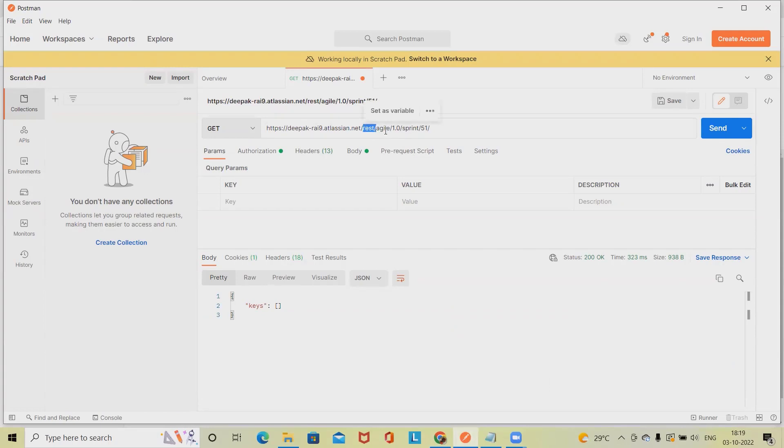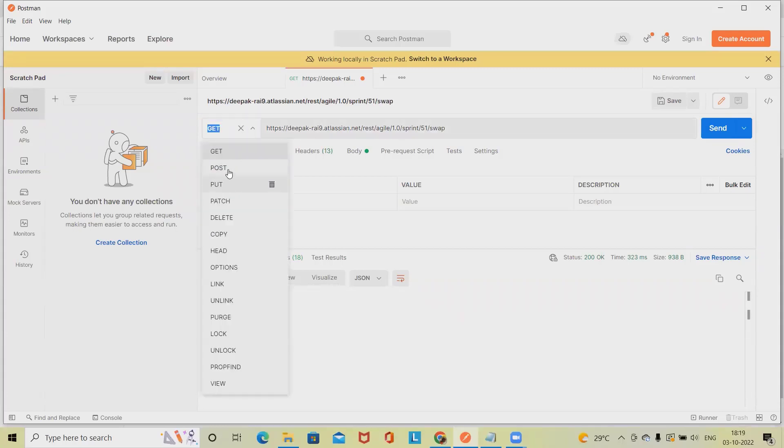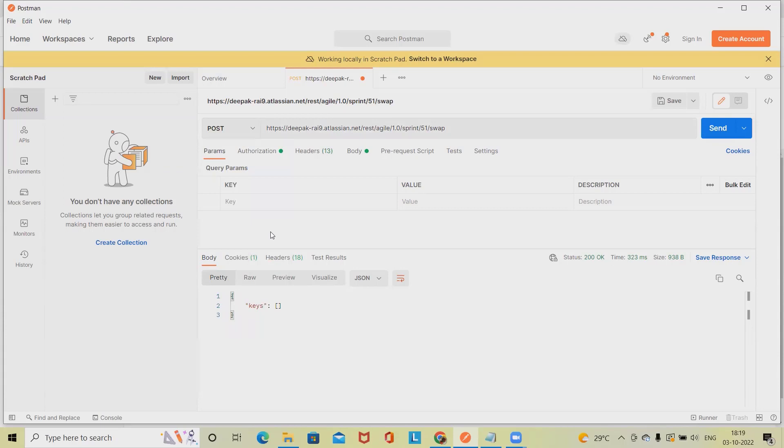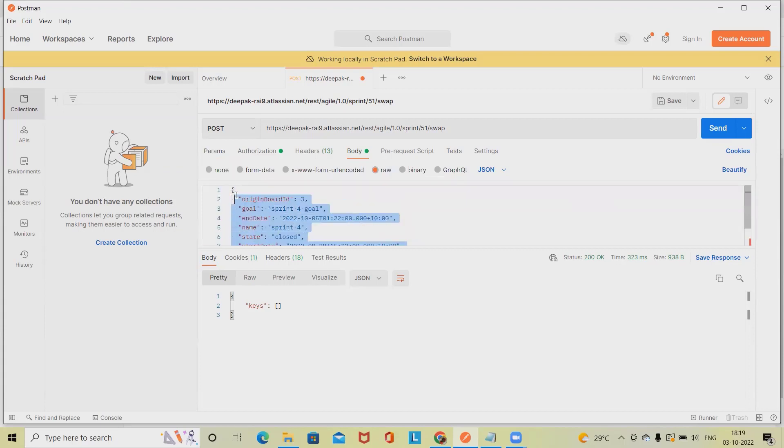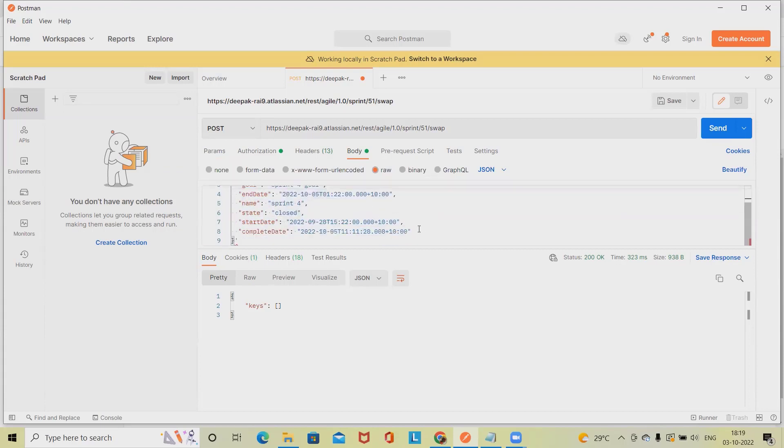After that, we have to specify rest/agile/1.0/sprint with the ID 51 as my ID, and then we will write 'swap' here. We will use POST method for swapping. We have to add some string in the body section, so here we'll modify the body.